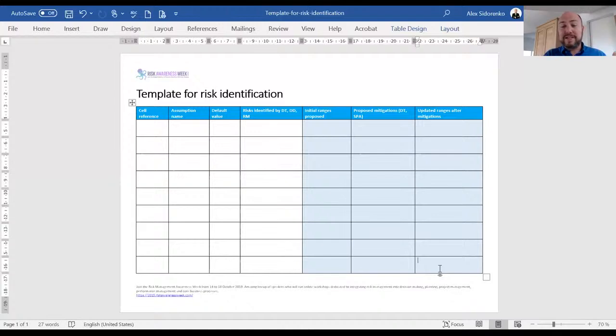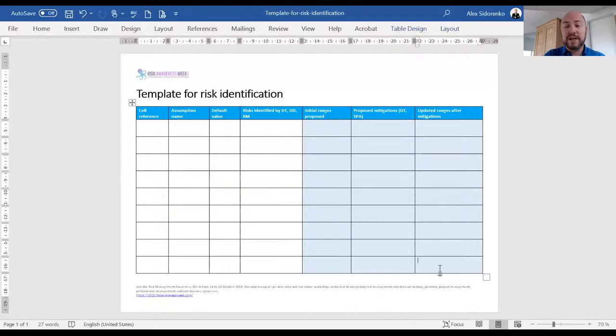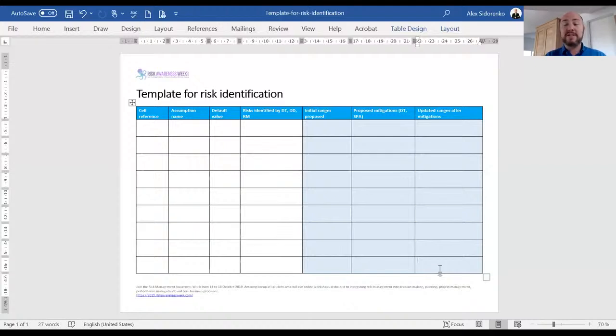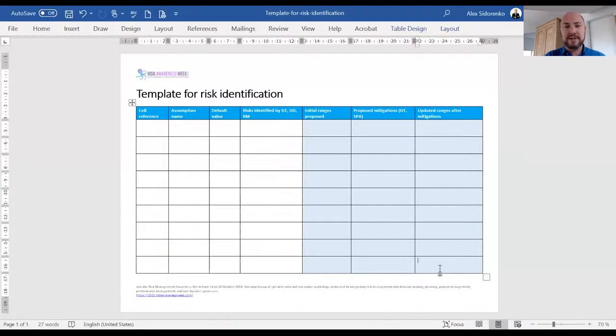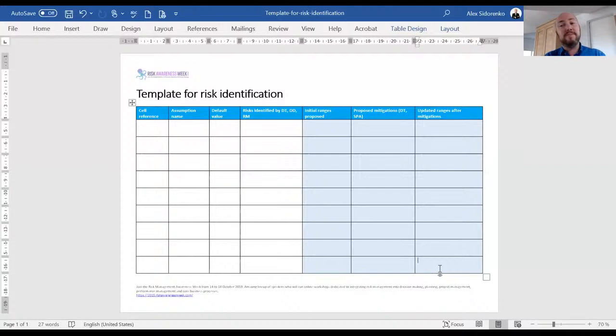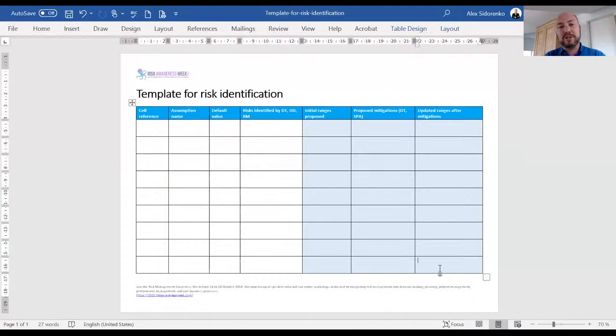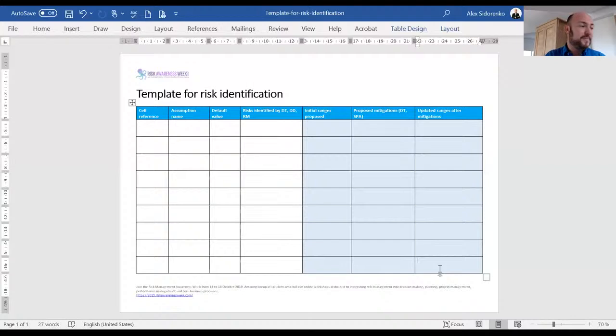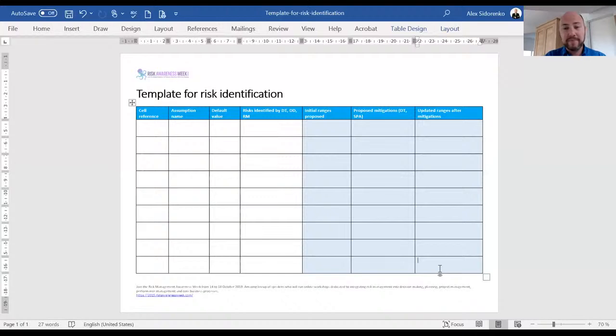This is an amazing template. I wish one day we started using this instead of the traditional risk registers that we currently have, because this drives proper behavior of first investigating assumptions, second linking risks to the assumptions, third linking mitigations to the assumptions and the risks, and then running simulations. And this risk register, this template, is actually built on two techniques. One is called key assumptions check, and it's a tool extensively used by CIA analysts. It has been used for years.